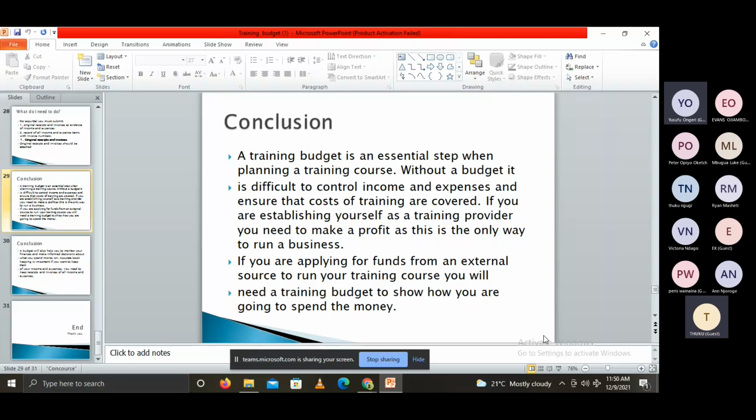What kind of vehicles are you buying? How much is it going to cost one? So you simply multiply the number of vehicles times the cost, sometimes the average cost. But like we have said, to enhance the accuracy of your budget, it's good you ask for a quotation. A quotation will tell you this is what it will cost you.